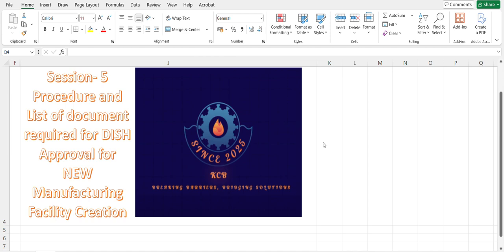Then you need to go for the DISH. There are several steps. First is the consent to establish a new facility, at the initial stage. After that, before the commissioning of the plant, we need the consent to operate. Both of these consents we receive from the DISH body.